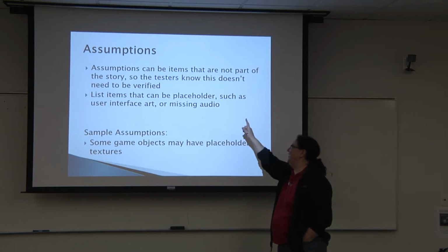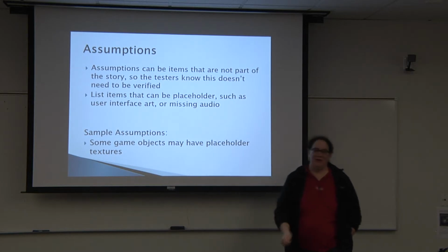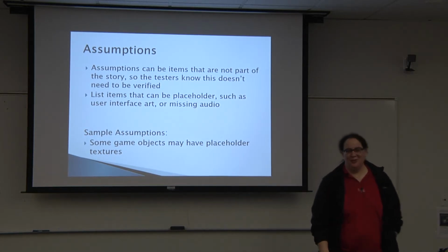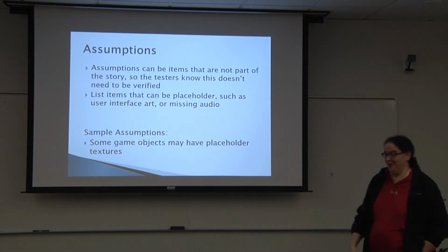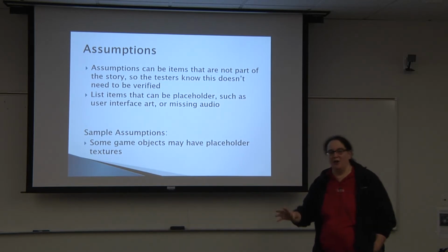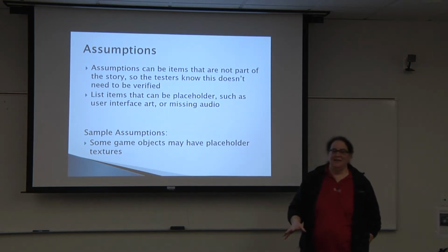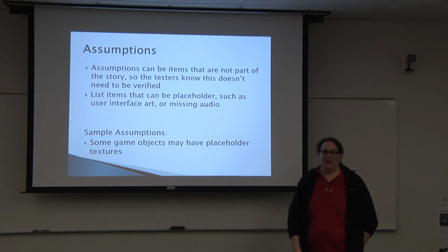But I'm just going to say, on the subject of placeholder content, I did learn one very painful lesson working on Superhero Squad Online with Chris Vanover, which is you can have art that is not valid, but never have numeric data that is like, oh, this is going to change later. Always try to have something that you want to ship with.